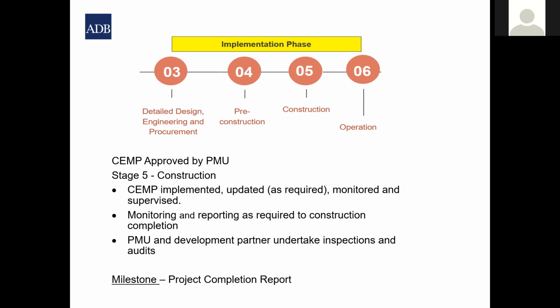So what we do need is that whatever activity, whatever section he is going to be working on, the site-specific plan for that particular section or activity is approved. So you can get an overall construction environmental management plan with all of the upfront, overall stuff, and also approval for the specific immediate activities that he's about to go into.